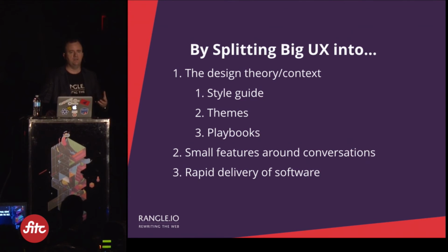So if you're measuring metrics on that Agile delivery team, and you're getting your design work done, and it's getting done in time, that means you can deliver value at a certain pace. And we look at cycle time and work in progress. So from the time we start a new feature to the time we ship it, we want to have a cycle time under 3. So that means 3 days. If that gets higher, if our average cycle time is 6 or 7, that tells us that there are severe process issues.